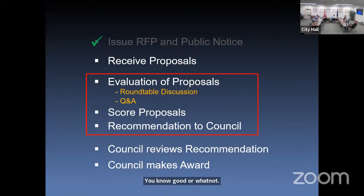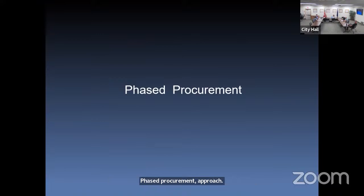All right. I only have my concluding comments, but I need to make a sidebar just right here. This project as a whole, because of long lead items that we've been talking about, ever since I think COVID hit in 2019, we basically saw some serious disruptions to supply chains. And so what we're trying to take on with this project is a phased procurement approach. And like this membrane package, we're trying to get some of these long items evaluated in a competitive environment, because we're required to do that.